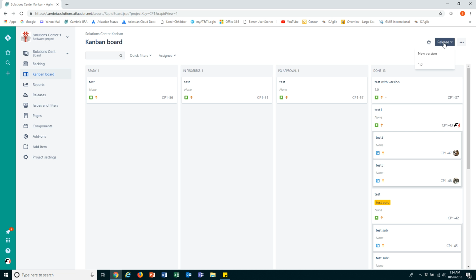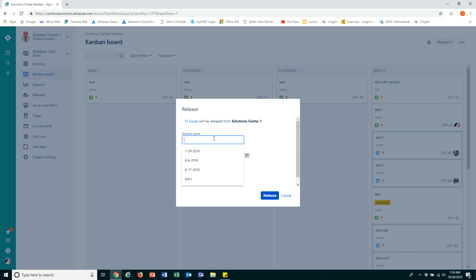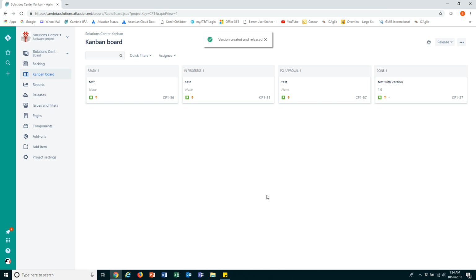We go ahead and we hit release. We're going to hit a new version. And if I'm not using fixed versions, I just like using the dates. So in this case, I'm going to say 10/26-18, and I'm going to say release. Now, all of the stories that didn't have fixed versions are now gone off the board. You can see that they have fallen away from the board. The only one left was this one right here because it had a fixed version.